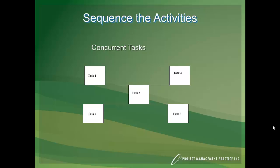And because they have, task 4 and 5 have the same predecessor, that means that they will occur at the same time or by default be concurrent. So that's more of a concurrent scenario.